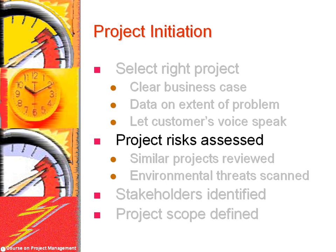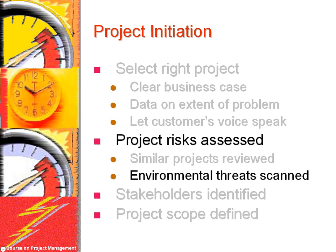Before a project is undertaken, the risk to success should be examined. The longer the project, the more likely the chances for failure. Risk assessment helps the project manager understand what might go wrong and plan for it. The project manager should review similar projects in the organization or outside the organization to see what lessons were learned. The environment should be assessed, the budget of the project should be examined, and threats to future continuation of the project should be anticipated. Availability of other resources, like key people, should be examined. Alternative courses of accomplishing the project should be examined before one starts.